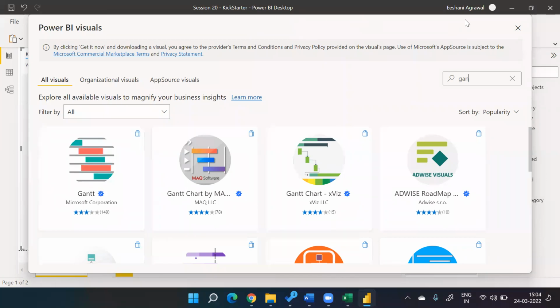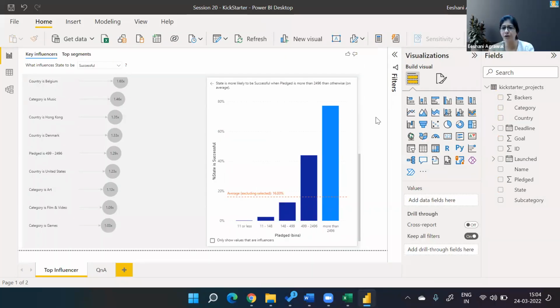All right. I don't know what you used it for. It's typically project planning. That's what I've seen in my career throughout. Yes, we do use it for certain dates to be completed in some amount of time. But it has to be related to one single project in multiple steps, and one step having dependency on the other. Then it makes sense to put a Gantt chart. Otherwise, it's a task list like I have with me. To-do list.